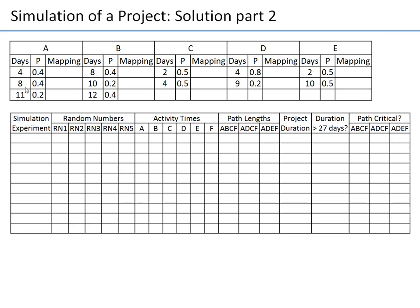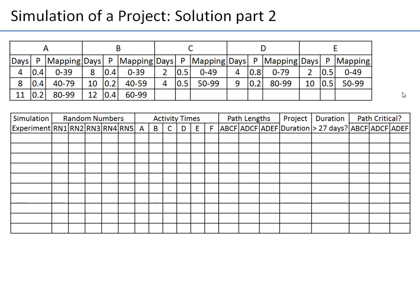For simulation with random numbers, I need a 0-to-99 mapping. For activity A: four days has 40% probability, so random numbers 00–39; eight days maps to 40–79; eleven days maps to 80–99. Similarly I create mappings for the remaining distributions for B, C, D, and E, and generate random activity times for each experiment — F always takes five days.